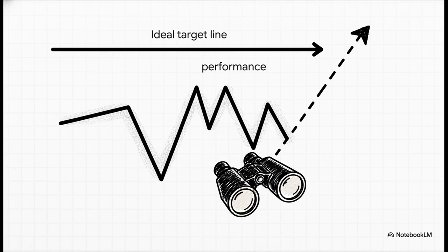To navigate all of this safely, we utilize Earned Value Management, or EVM. Guys, this is the absolute gold standard for project controls. EVM allows you to constantly, mathematically track your Schedule Performance Index, or SPI, and your Cost Performance Index, CPI. If your SPI drops below 1.0, you are officially behind schedule. But the beauty of EVM is that by forecasting completion dates based on your current performance, you can proactively develop extension of time recovery schedules long before the client even realizes there's a risk.